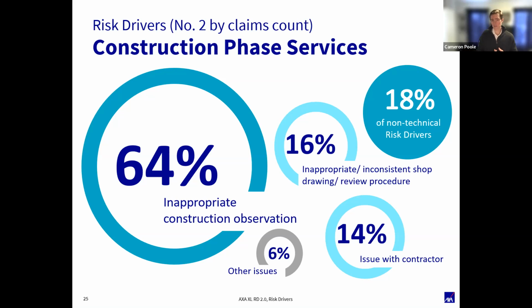During the construction phase, one thing to really keep in mind in terms of taking photographs, I always tell people either step way back and take a photo of the building, or get right up close to exactly what you're trying to take a photo of. You get yourself into trouble in that middle area, where you're just taking photos of an entire room, because the camera is catching things that you're not catching with your eye, essentially. So take photos of details or step all the way back.